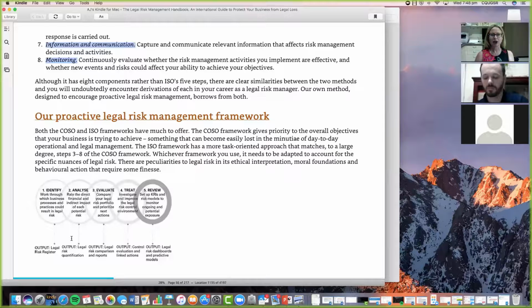Sum up those two, get an overall extreme impact there, and then you're moderating the two by coming up, as you can see down the bottom, with an overall impact. Okay, and you're going through this analysis for each of your potential risks. So what you end up with is down here,